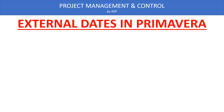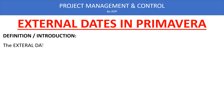First we will see what is the definition of external dates. These external dates are a sort of constraint, and like any other constraint, they may affect our future updates and updated program, and they may cause some results which are unexpected for us.